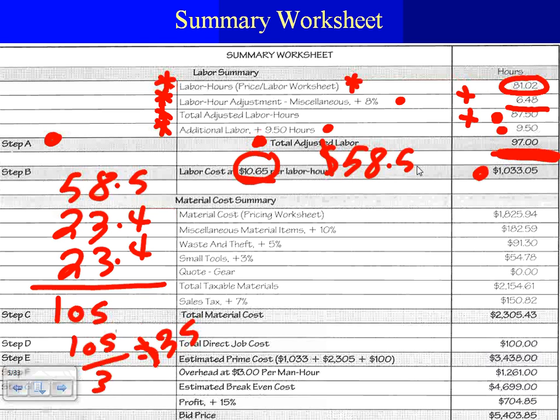So you need some money to pay the other people who are not carrying the tools. This money is just for the people who are carrying the tools. Cool? So a good rule of thumb, if this is your average job, multiply it by 2, that will cover your overhead and everything else with some profit. So if you bid at 70, you don't need to add overhead and benefits and so forth down here.